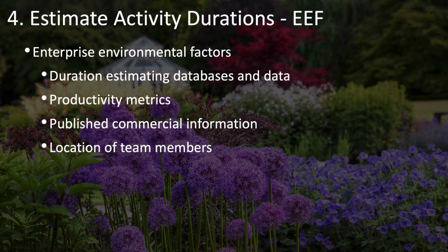In addition, you may be able to use some published commercial information that has details about how long certain activities tend to take. At the very least, this could be useful information to compare to your organization's data on how long it takes to complete these sorts of activities. And you can do a little bit of baselining to see whether your organization is more or less productive than average.